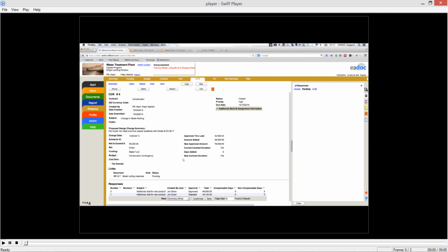So that's kind of the first step. I know not everybody has kind of that potential change order back and forth with their contractor. Sometimes you just have an amount that you negotiate together, and then you issue the change order directly. You don't have price negotiation necessarily in the system. We can certainly enable that for you to bypass this next step. What the next step allows you to do is either roll up or have a secondary approval process.